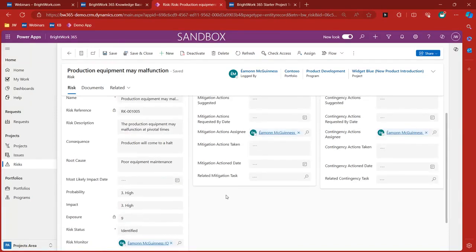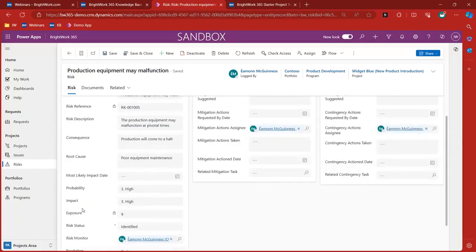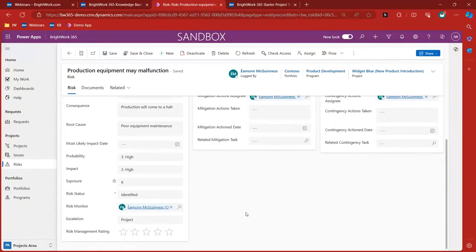But I guess the most important piece would be to assign a risk monitor to it. So we give you that opportunity here. The risk monitor is going to be the one who keeps an eye on this throughout, until you have that pizza party at the end of the project. They are going to keep an eye on this risk at the different stages of the project once it's in execution, to see if we are coming real close to this risk actually happening. I guess a bad example, but the only one I could think of at the moment: maybe you're in a hurricane or typhoon prone location, and you put down as a risk that your server room might get flooded, or your power plants might get flooded. All of a sudden everybody's watching the weather forecast, and you see that there is a storm out there in the Pacific, Indian Ocean, Atlantic Ocean, what have you, and you could literally see it coming closer and closer to your location. It's the risk monitor who's keeping an eye on that.